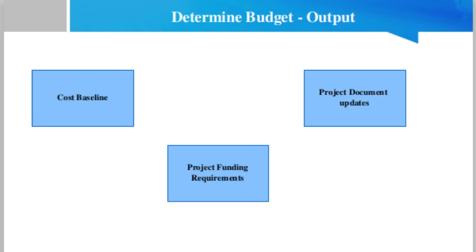Funding often occurs in incremental amounts and may not be evenly distributed. The total funds required are those included in the cost baseline plus management reserves, if any. Funding requirements may include the sources of the funding.